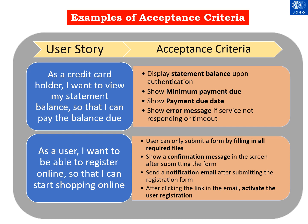The second user story is: 'As a user, I want to be able to register online so that I can start shopping online.' There are four acceptance criteria: user can only submit a form by filling in all the required fields, show a confirmation message on the screen after submitting the form, send a notification email after submitting the registration form, and after clicking the link in the email, activate the user registration.